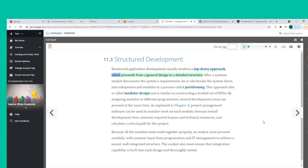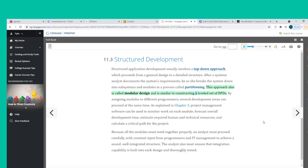Structured application development usually involves a top-down approach, which proceeds from a general design to a detailed structure. After a systems analyst documents the system's requirements, he or she breaks the system down into subsystems and modules in a process called partitioning, also called modular design. By assigning modules to different programmers, several development areas can proceed at the same time.